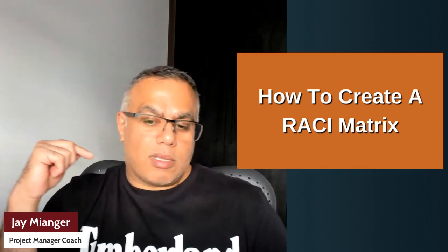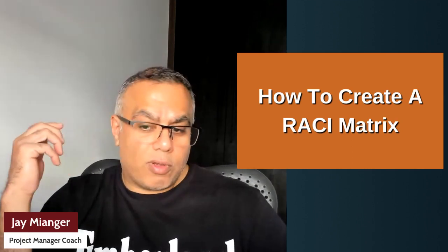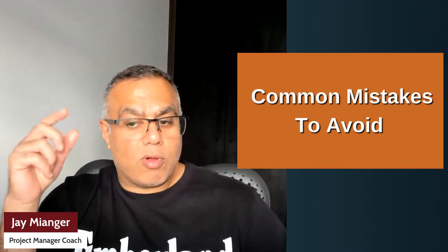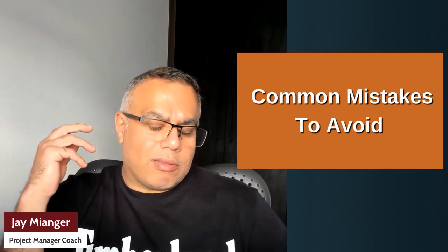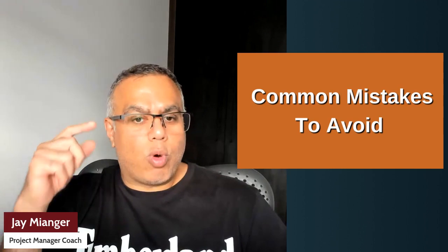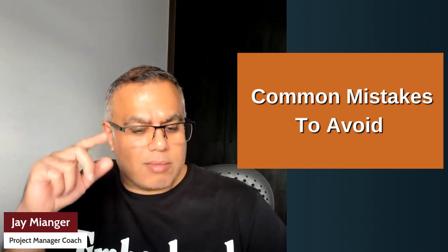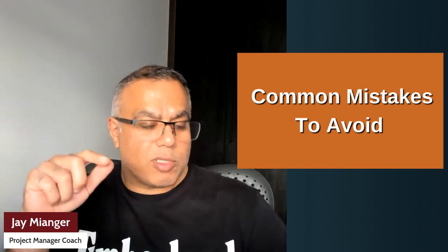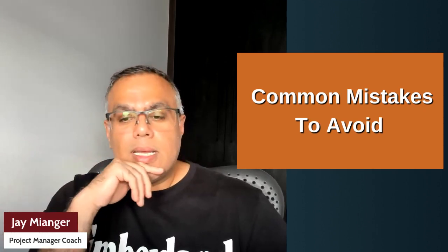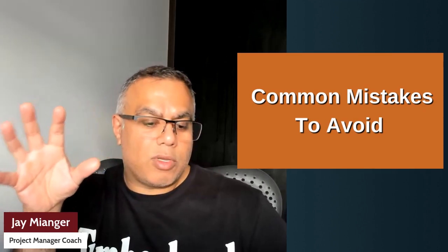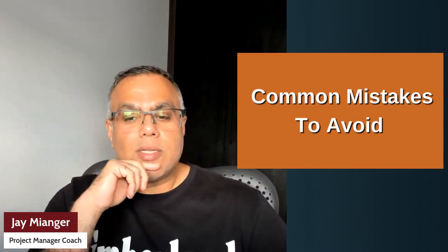One of the common mistakes you should avoid is role overloading: assigning too many roles to a single person. The standard is one role per person only. You can make somebody responsible and accountable, however I will try to avoid that where possible, because it can create some ambiguity about who you're going to. If you use it right, it doesn't, but it can.